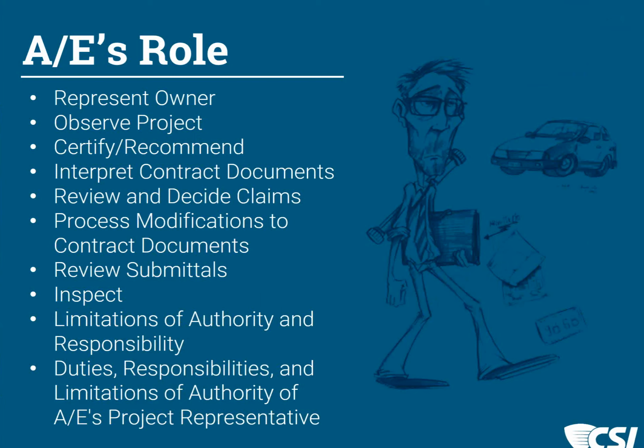In the next role, we are reviewing submittals. We're taking action on construction submittals that the contractor sends us. Perhaps these are pre-construction items. Perhaps they are schedules of information, schedules of values. Perhaps they're subcontractor lists or product lists. There's a long discussion about submittals that we'll have in the future. But that's one of the roles that we review and take action on.